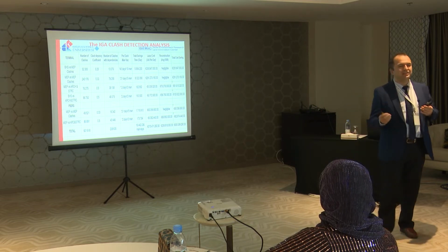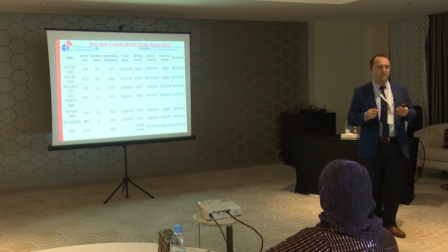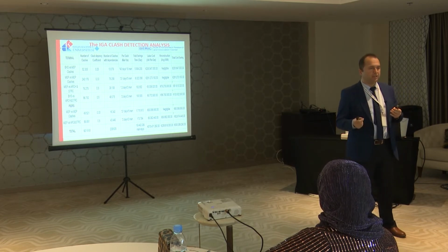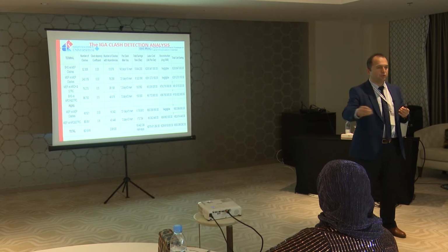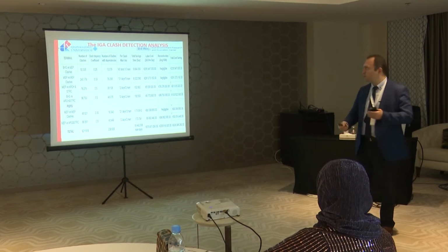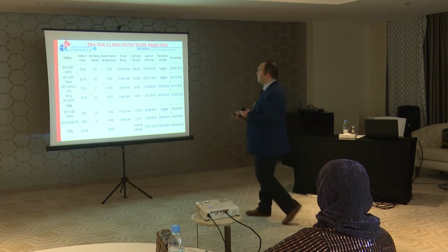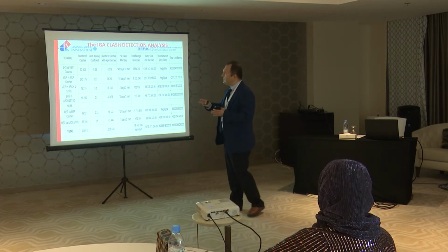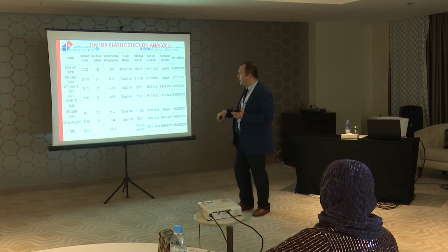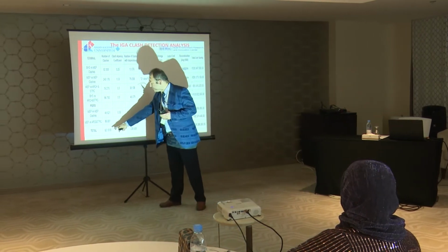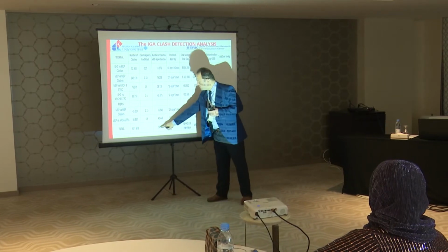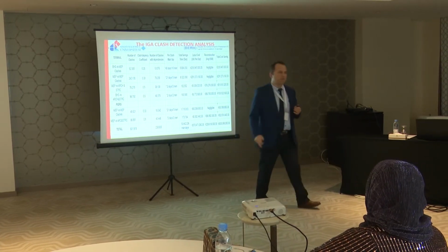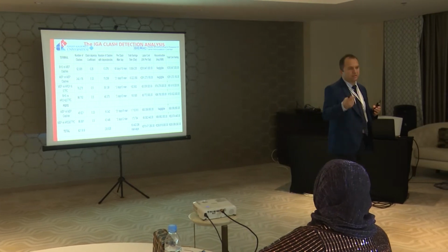There are some dependencies as well. For example, when you identify a clash, there are some dependent clashes, so you can automatically fix those dependent clashes too. So we also identified the coefficiencies between those dependencies and reduced those 600,000 clashes to about 330,000 clashes in terms of correction.